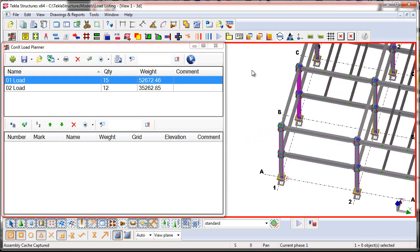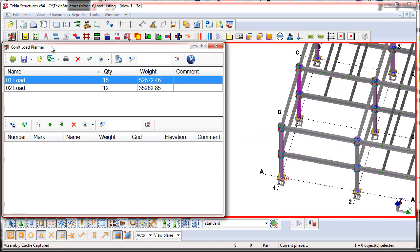Now the first thing we want to do now that we have seen a new model here, and there are design changes, is we're going to press the Update Loads button. This will then scan through the current model.